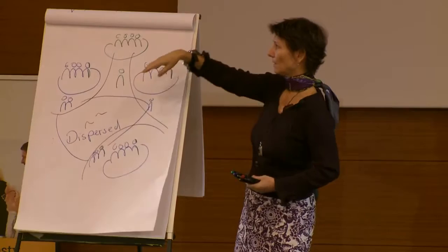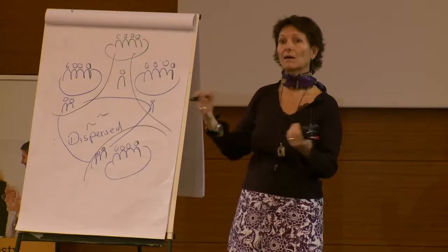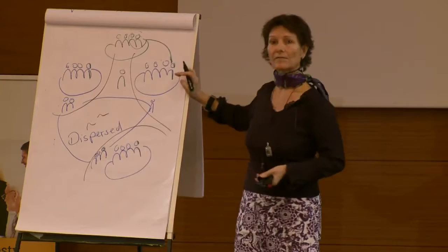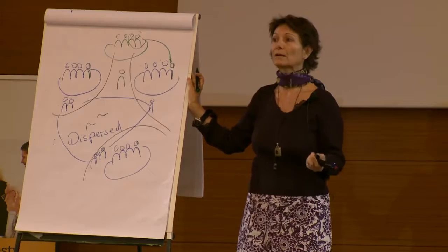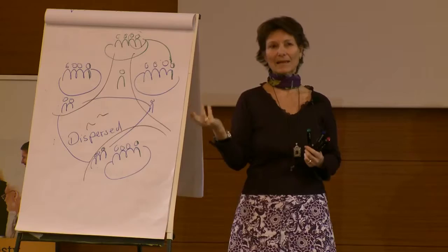So it's more like people like those people here, but they are not working as a team. They are more whenever one of them needs the support because they are entering an area where they are very uncertain, where a lot of changes are happening, then one or two of them become members of that team for the period of the time they are dealing with that. And then there are regular members helping them. So it's not like any kind of PowerPoint or something. They're really working with those teams. And so that's what the consultancy aspect is, just that they're supporting for a specific amount of time.